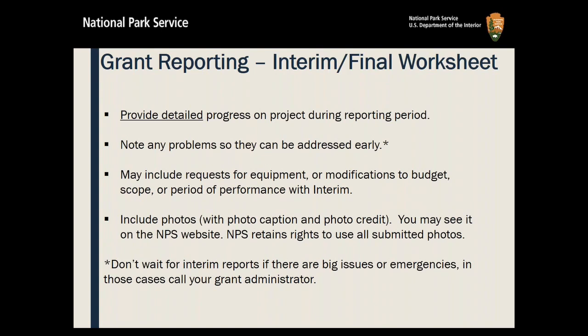On your interim report, you want to provide detail about the progress you're making during the reporting period. You want to note any problems that you're having so that we can address those as early as possible. You can also include requests for equipment or modifications to the budget, scope, or the period of performance within the interim report.